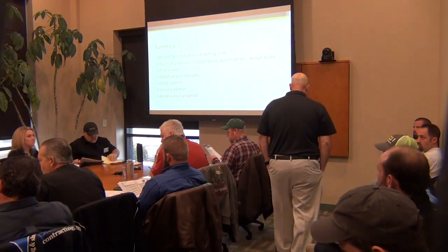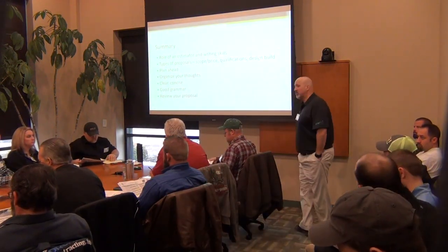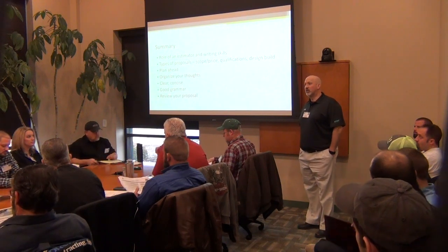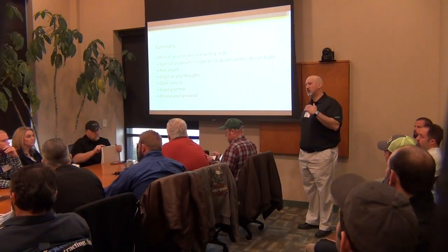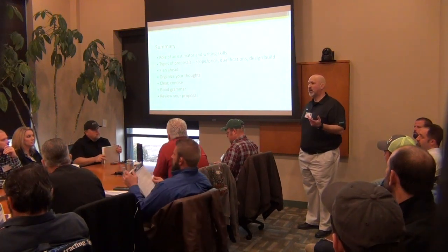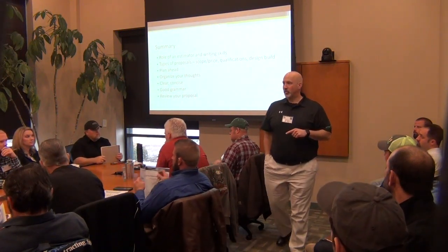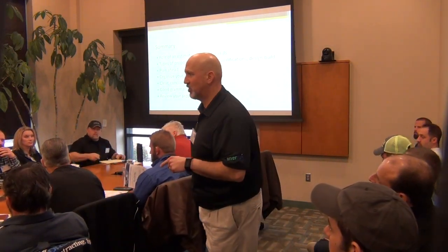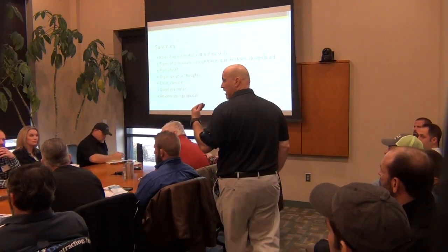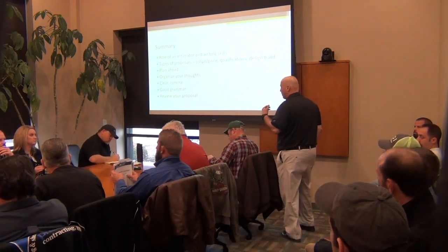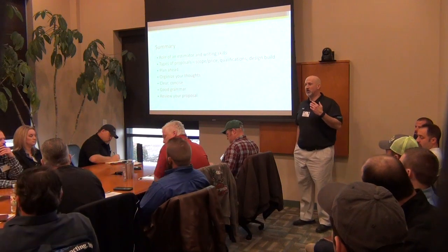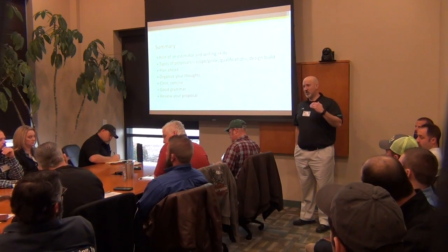It's a good point, because it happens to us too. You've got to sit down and just negotiate. Fine. You go back and look at your proposal and what's really important to you and what's not. There's always some give and take. The reason they don't want you to put your proposal in there, I can tell you this, I know for a fact, is because they don't like your exclusions, right? They want to hold you to their standard conditions, general conditions. So what you have to get to is a point where you understand what their terms and conditions are.